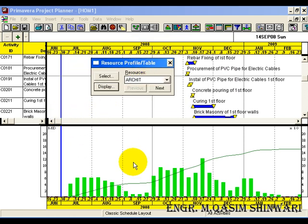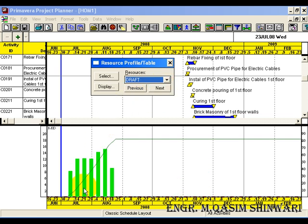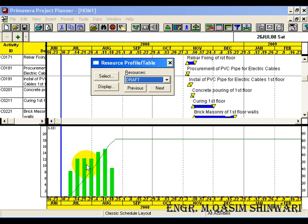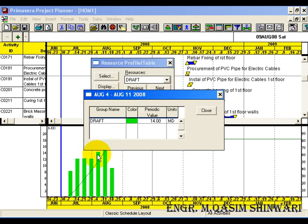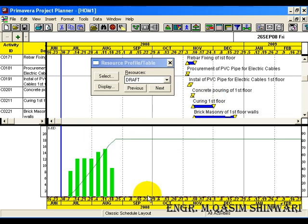These are the histograms shown for the architect. Now I want to show for the draftsman. So it's the curve for the draftsman and this is the histogram. If we see that histogram is in red color, it means that it is exceeding our present resources. Now let me click over it. Here you can see group name, draft, its color, periodic value and units, members per day. So the periodic values are also shown here.